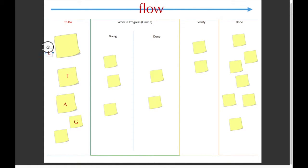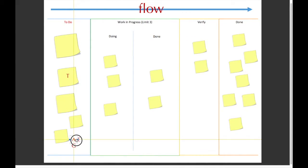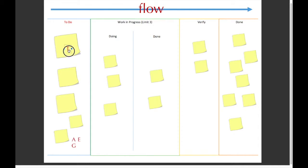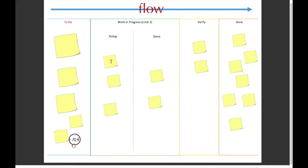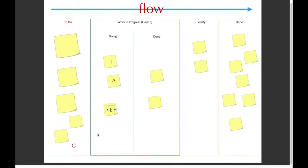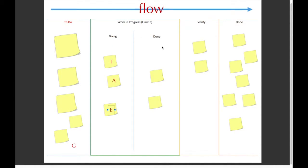Let's say T wants to take on a job, so he's going to take this sticky note and move it to the doing column. Then A wants to do this one, so he'll move it to the doing column, and E wants to do this, so he'll move it here. So in the work in progress we have a limit of three.